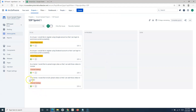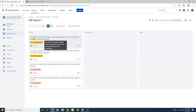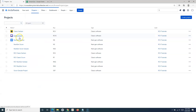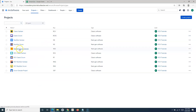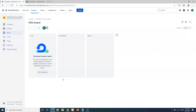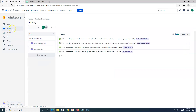This is your sprint backlog added within this particular sprint. That's how you create the sprint backlog in a classic scrum project in Jira Cloud. Now let's move to the next-gen scrum project — I'll open the next-gen scrum sample project. The process to create the sprint backlog is the same in the next-gen project; simply go to the backlog.